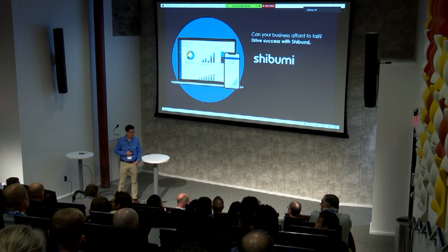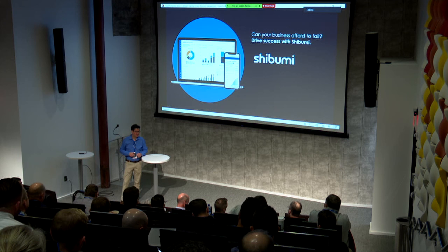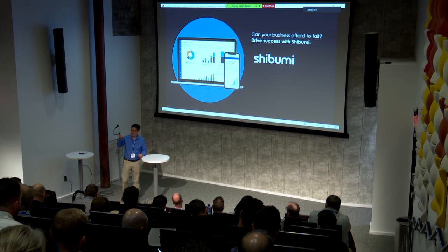Oops, sorry, we have one more question. Continuous, because I guess it's all based on association, assigning an individual resource to many roles. Yeah, that's what I thought Ethan was talking about. So we don't in our module. Oh, I'm sorry. The question was, could you have an individual resource who supports multiple pools? And I thought that's the question Ethan was answering. Okay, so yeah, you can associate multiple roles as child items and put a percentage in that tells you how much of their time goes towards each of those pools. You wouldn't want to double count the person into two roles, right? Because they'd be double booked.